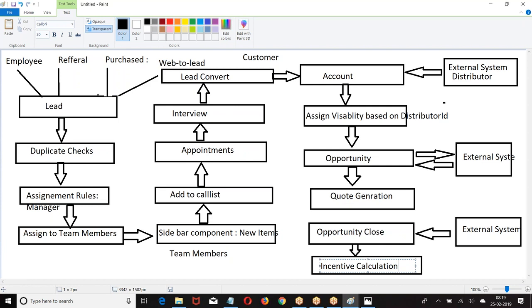Okay. So this work is shared among these 5 members. For everyone, 3 points. So weekly 5 into 3, 15. But out of 15, 3 points are spent for testing. So only 12 points of development will happen every week.